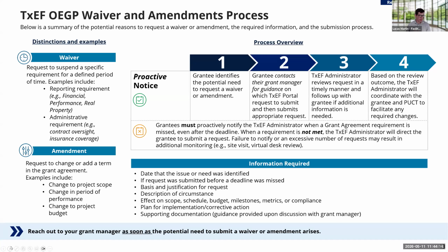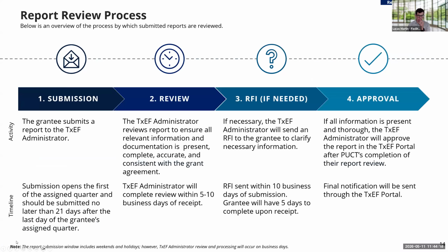With that, I think we can move on to the report review process. Kind of going back to the reports, obviously they'll be submitted by you all within the first 21 days of your assigned month that we touched on. We'll review those reports. You can anticipate that if we have any questions, an RFI will come within 10 business days of the receipt of those reports.